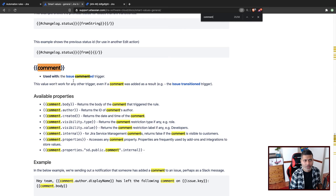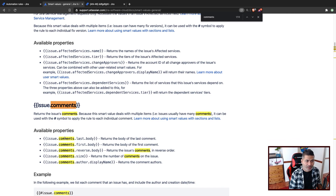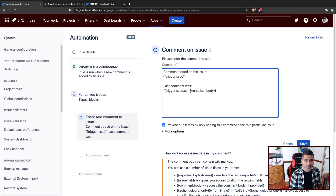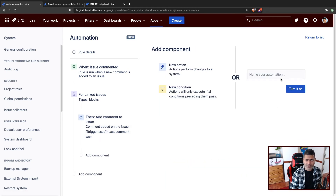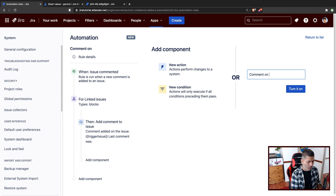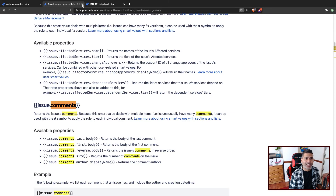Since we can have multiple comments, the correct smart value is something like issue dot comments dot last dot body. We are working on the comment from the trigger issue, so the full smart value references the trigger issue's last comment body. Let's name this rule 'comment on blocked issues', turn it on, and validate whether it works correctly.